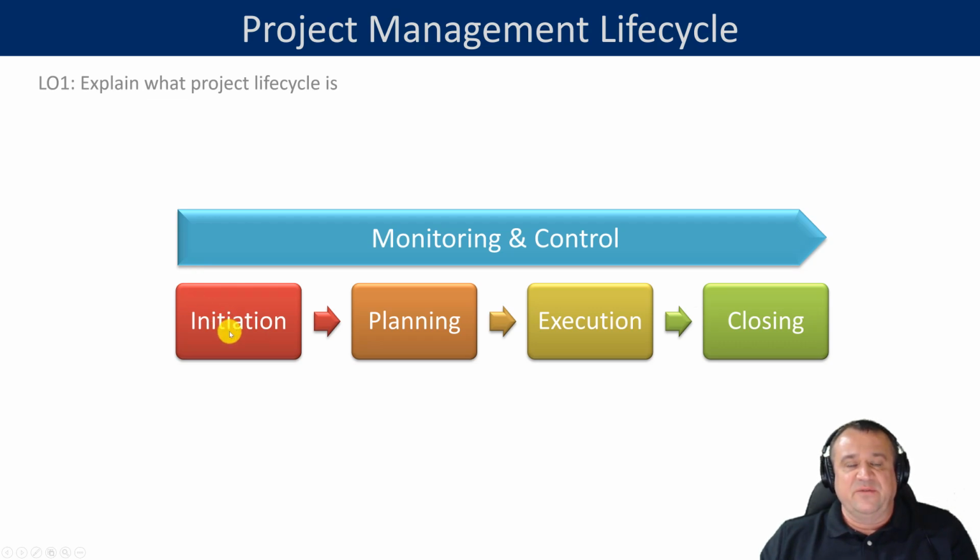This is the phase where a project is conceived. By that we mean that a project is described from a very high-level perspective. In other words, there's a conceptual description of what the project is and what it's supposed to deliver. This conceptual understanding of the project is usually captured with a document called a project charter. The project charter formulates the main vision for the project, the main business goals, and the main approach to the project. Sometimes a business case is also included as a part of the initiation phase, which means an exploration of how feasible and valuable the project is from a business standpoint.